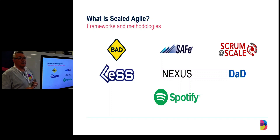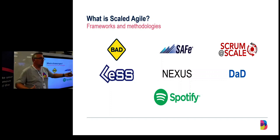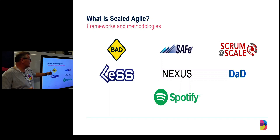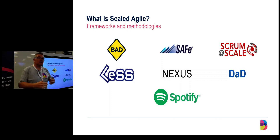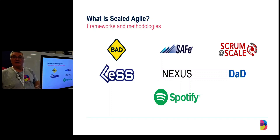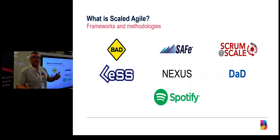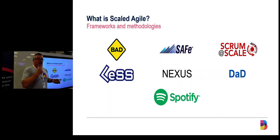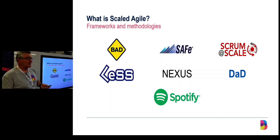There are lots of different frameworks and they suit different businesses. I started using Nexus with three or four teams working on loosely coupled projects — it's easier because it's an extension of scrum. Models like SAFe are very detailed; if you want true agile across a whole organization, not just the delivery team, SAFe is fantastic, but it's a lot harder to implement. Then there's DAD — blended — where you can chop and change and use the bits that really help your organization. Makes perfect sense.